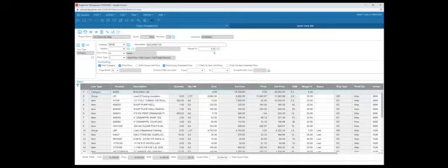So I might have my base bid, and then I have an alternate bid. I can go into the category level, and maybe I want to change everything in that base bid to a 22% markup or gross margin. It'll sweep down and fix all my pricing for the job.